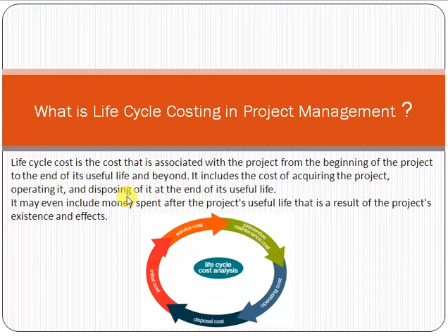For example, the initiation of a project, development, then testing, then deployment, then the operational work will start, and then after some years or some months it will be disposed of. So you have to consider the overall cost here, not only a small piece of time. This is called the concept of life cycle costing.